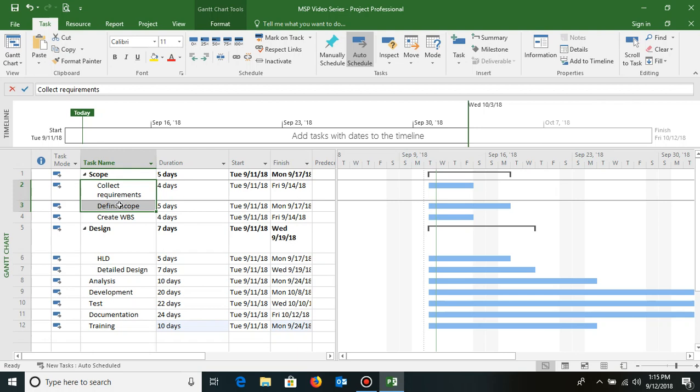I prefer that an activity, once estimated, though it might differ from industry to industry and project to project, should not deviate by more than 5%. That is how real I want to make my estimates. It might be much smaller, lesser than 5% also in some cases, but nothing beyond 5%. 5% is the ultimate threshold which I keep for my estimations.